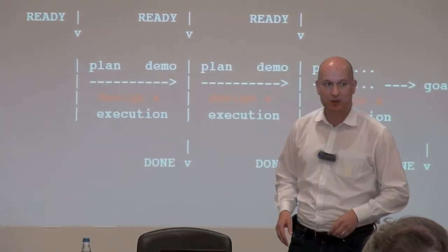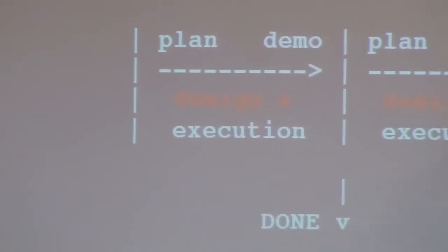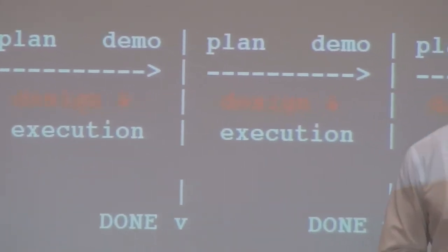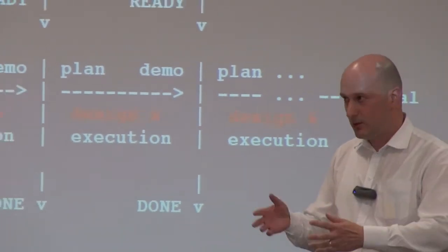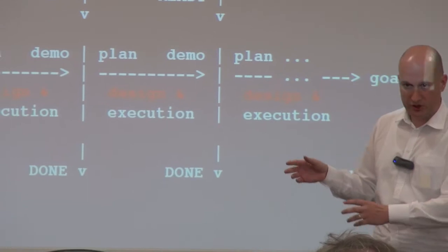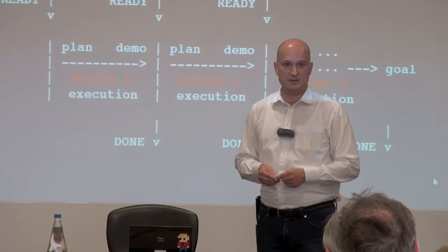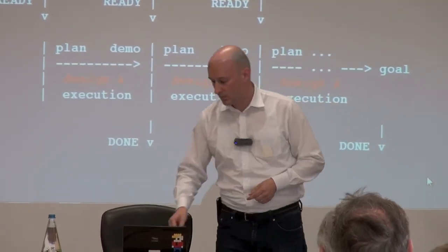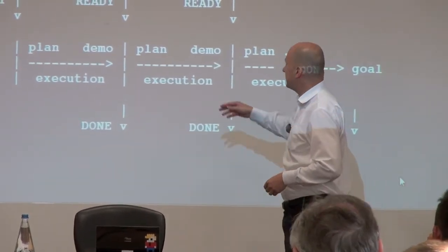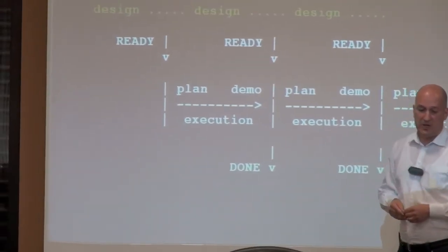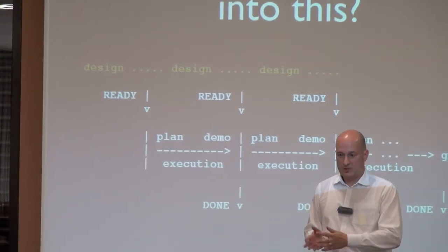In the case of the development of the first feature, design was part of execution. In fact, the design was basically derived from the implementation. We as developers said, look, we have these tables, let's just show everything in the tables, and the result made sense to the developers, but it didn't make sense to the customers. In the case of the development of the second feature, design came before execution. We were ready to develop it in full once the design was done.